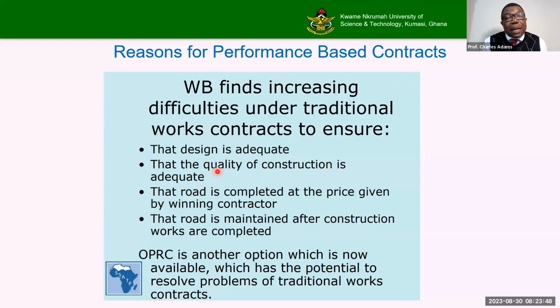Because with most of our contracts, we sign a contract, then by the time the road is finished, you will see that we have doubled the value of the contract. So nothing is predictable anymore, because either we didn't prepare the design well or we did not have enough time to really do our investigations before we put the contract together. So OPRC gives you a way that the contractor has to take those responsibilities and make sure they are done properly, and that the road is maintained after construction works are completed.